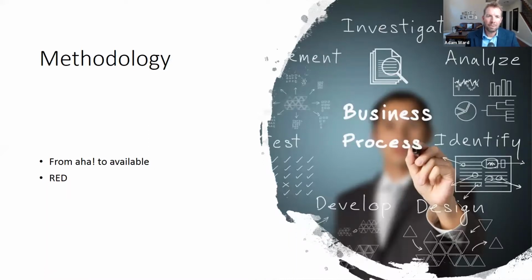But that's one of the primary things that we found, is that release cycle should match what a reasonable training cycle is with organizations. And we don't want to exceed that. One of the biggest things I hate is going to my app store on my phone and seeing 88 updates, and most of the updates saying bug fixes. I don't need to gobble up bandwidth to fix a bug fix that should have been fixed earlier.